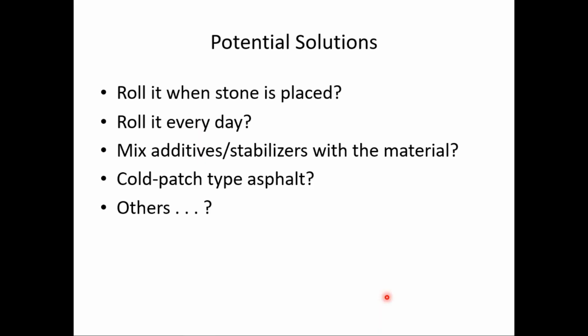And in one class where I was teaching this in person, someone said, well, I'm going to roll it every day. And I guess if you roll it every day, that may overcome some of the concerns I had about just rolling it initially and then forgetting about it. But every day in the pedestrian sense is literally every day, not just every work day. So if you're going to roll it every day, it needs to be every day, that may be an issue on a project.